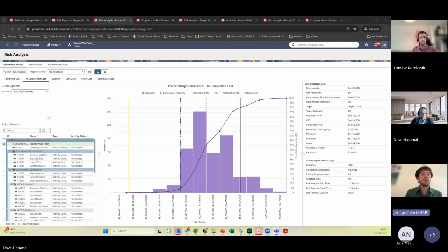But you're totally right, Thomas. You still have to choose what the soil type is, what the threshold is for that soil type, and then how many days of impact a certain amount of rain has. Is it 1 day or is it 2 days? Again, that's not easy to determine, and that is where users still have to use their best judgment to some extent.